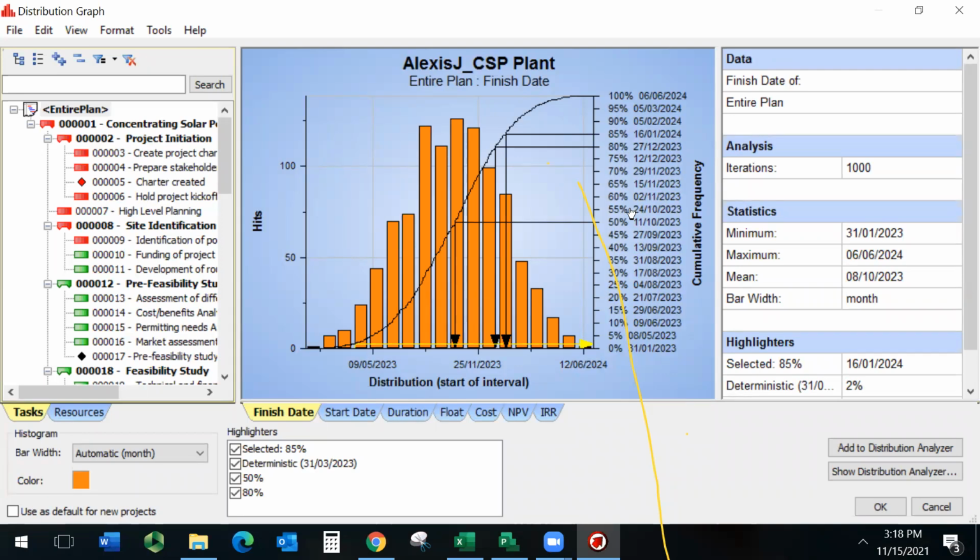So what is the probability for that? What we know is going to be important. For example, based on your experience, how many times did you code something and you didn't have a bug to fix? Then that's going to guide you in determining whether this activity may or may not exist. If it may exist, what is the probability? So that's what we call task existence probability.